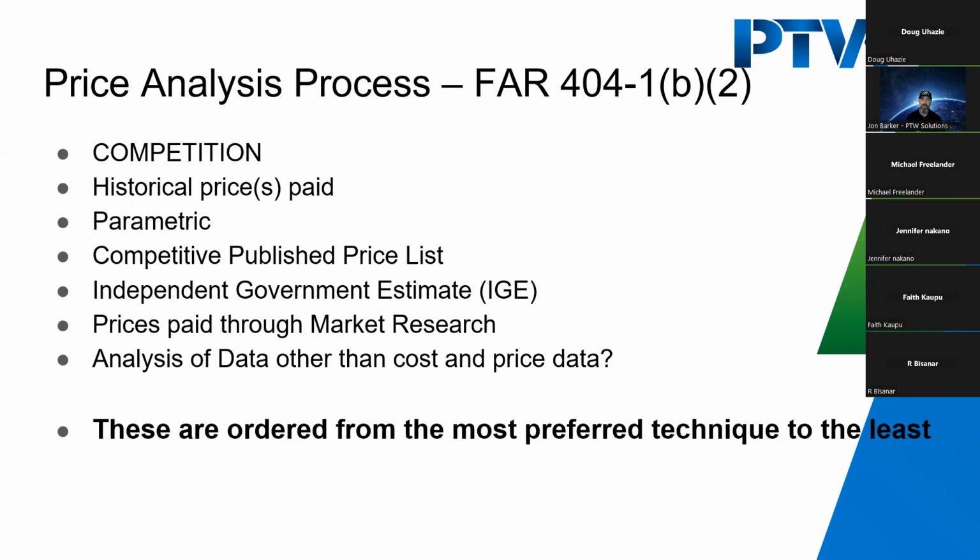So I would ask them to document a historical price paid. A lot of companies will redact who that client is, but they would say, okay, here's this bill that demonstrates that I have been paid this rate before. And so that's a very good basis for making that determination that it's a fair and reasonable price.